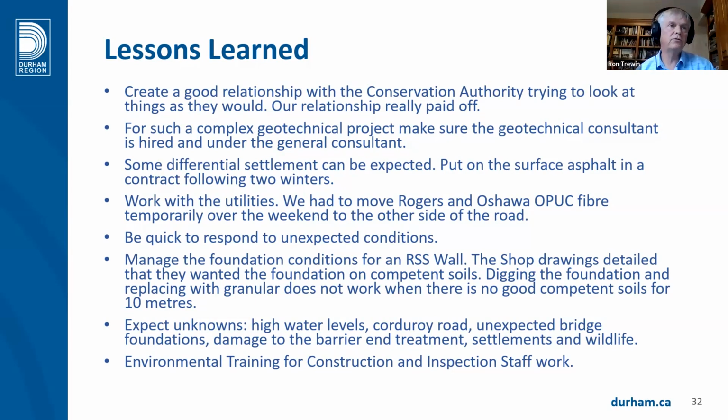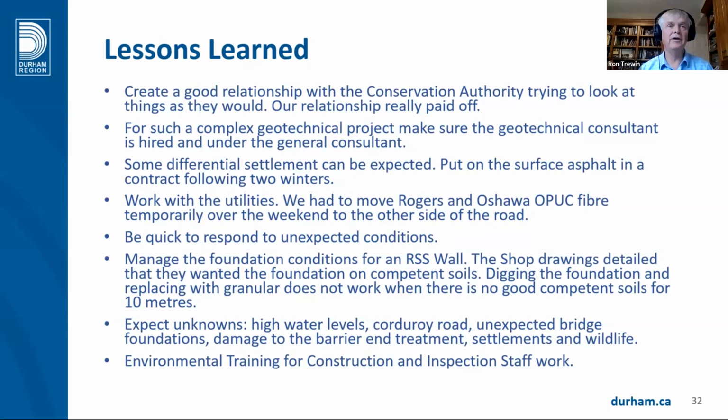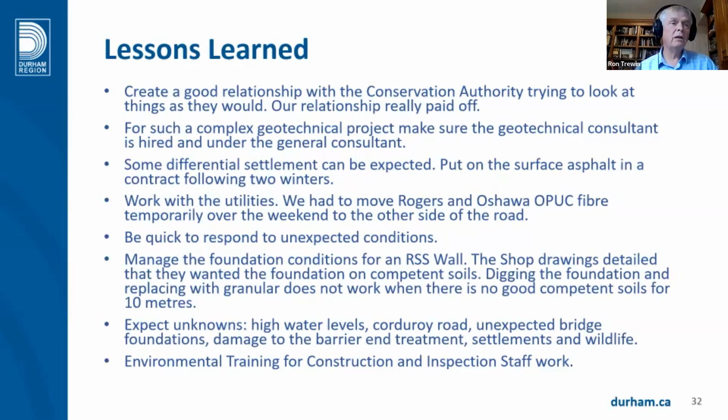Expect unknowns: high water levels, corduroy roads, unexpected bridge foundations, damage to barrier end treatments, which happened during construction, and we actually had that in the contract so they could deal with it. Environmental training for construction inspection work.